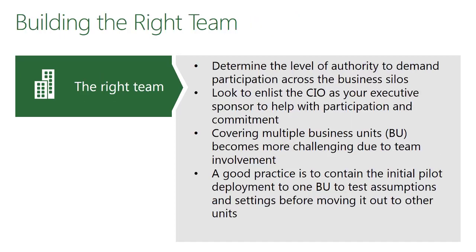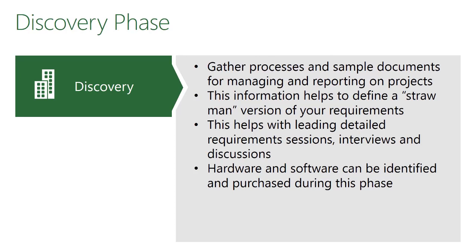The next part of it is making sure that you do have the right team and making sure that leadership signs off on allowing you to use those team members as you implement the tool, right? And that they are advocating what you're doing. The right team members will also ensure that you have the right technical personnel to help you with answering questions about the tool itself. In the discovery phase, you want to gather processes and sample documents. These are typically what you're currently using to manage projects, and this gives you a rough idea of what the requirements will be. This will then lead you into more detailed sessions so that you can move it into the actual configuration of the tool,